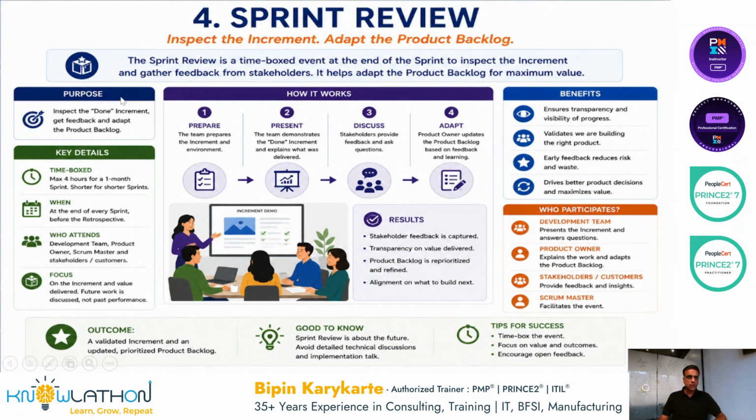So you do the inspection, you give the demo of that particular thing. If you can see here, there is an increment that is being produced by this sprint, which is being demoed to the people who are the stakeholders, etc. Again, time boxed, maximum 4 hours for a 1 month sprint, shorter for a shorter sprint.